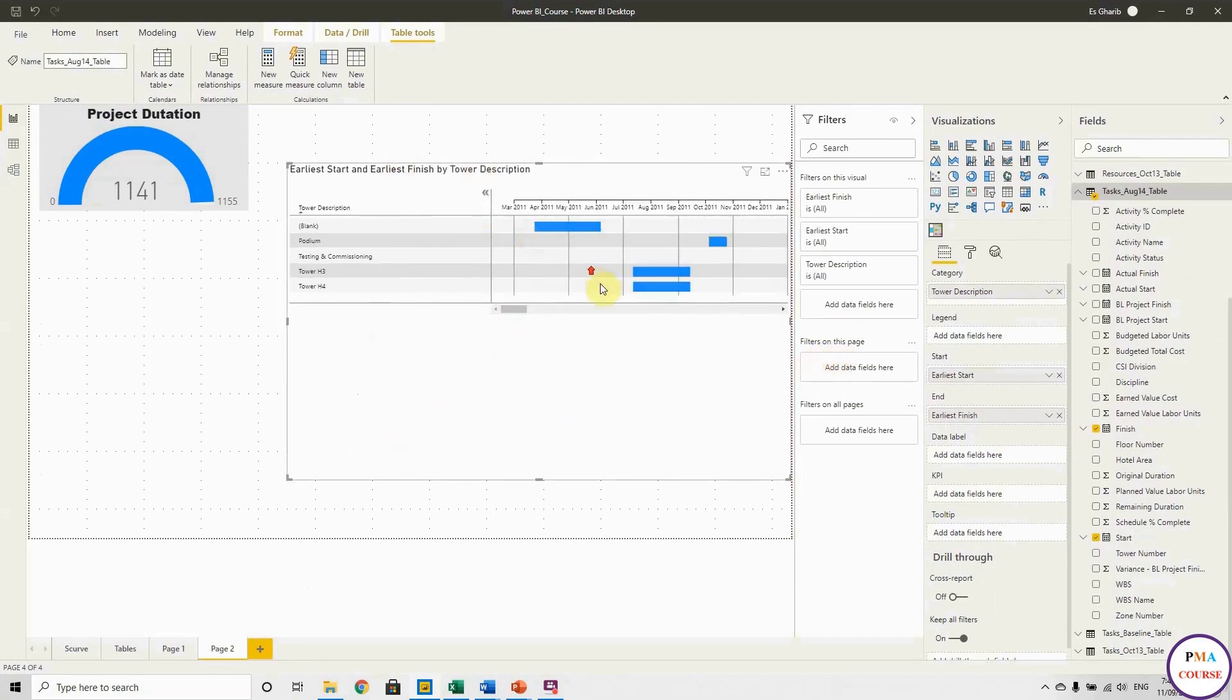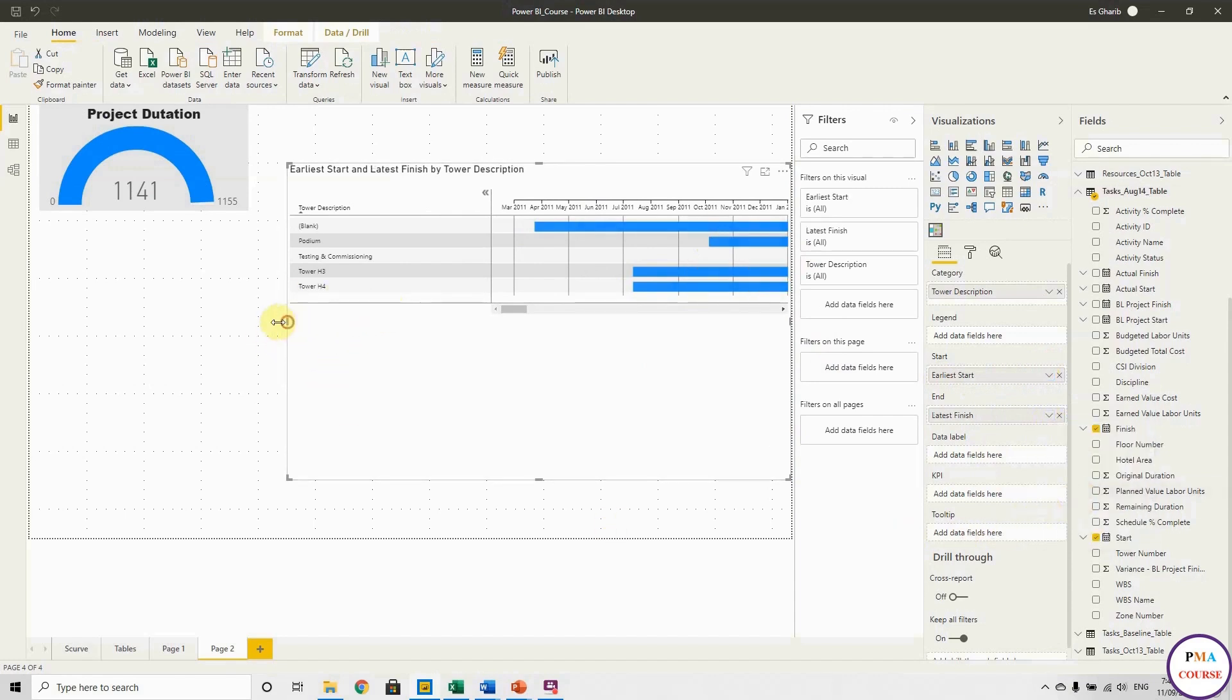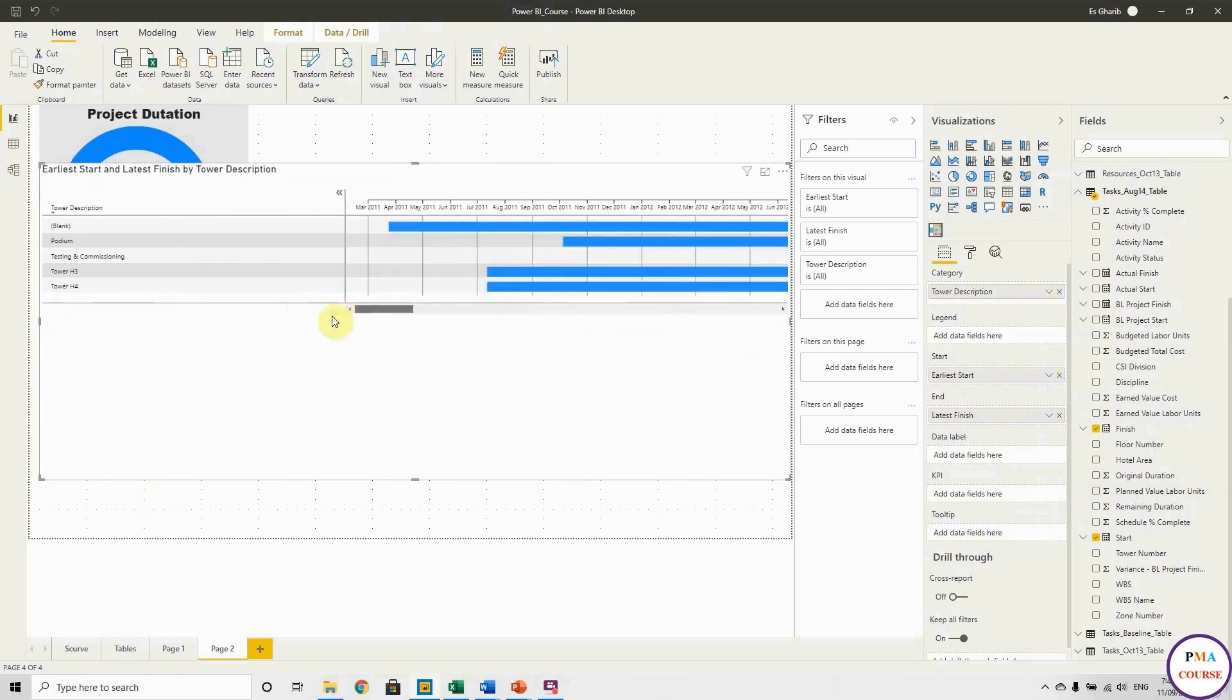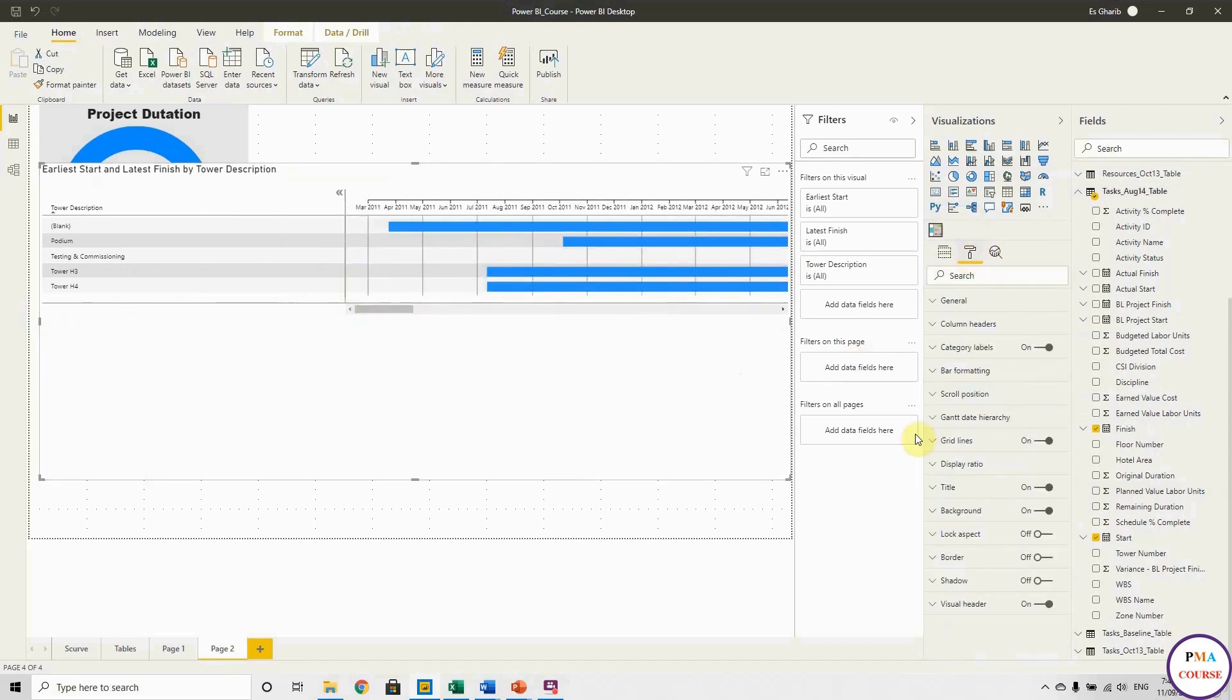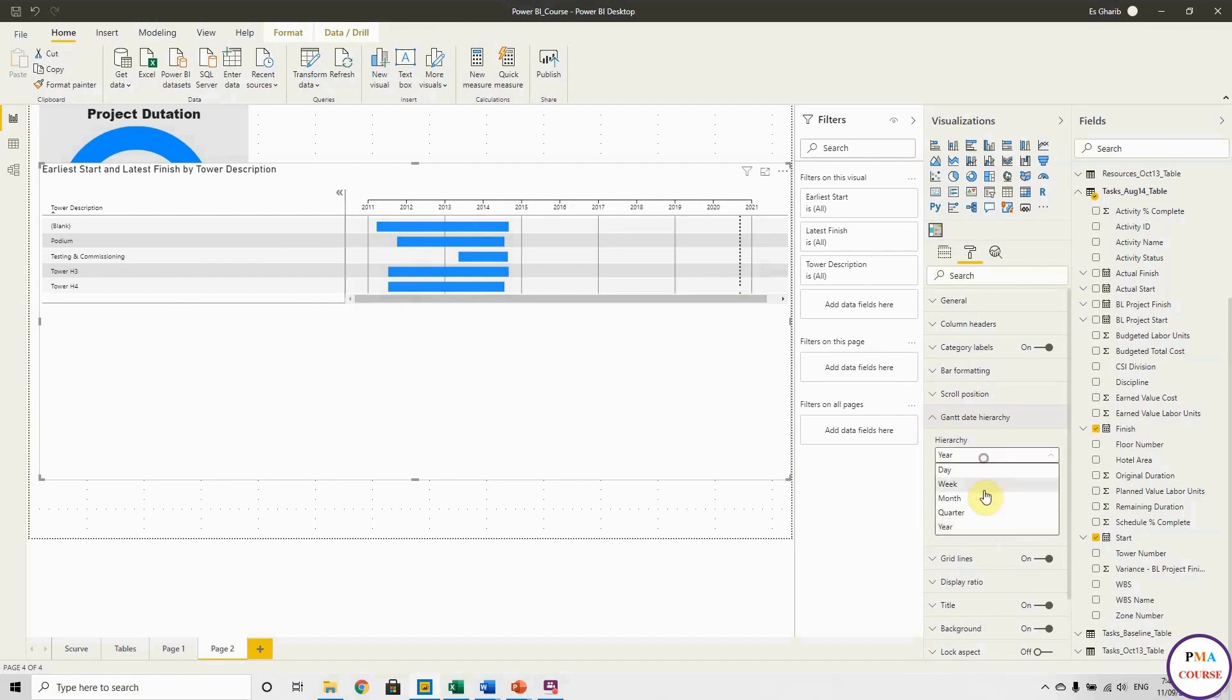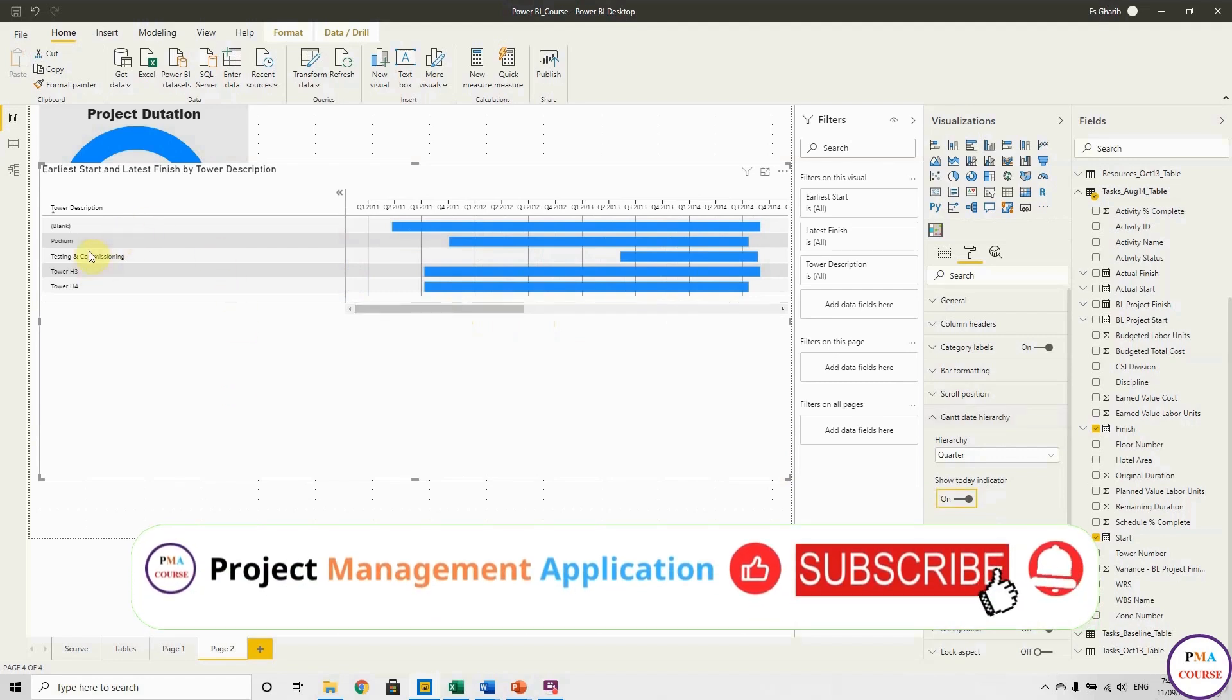Okay, it doesn't look right. Why? Because in the start we have the earliest start date, and in the latest in the finish date I have to choose the latest. Okay, so now it is okay. In each category I have the earliest start and the latest finish. Okay, but this comes with the timescale month, so I can go to Gantt data hierarchy and change it to quarter or year. Quarter is more realistic, so let's make it quarter. So here it shows the start and finish for all categories, for all the tower description.